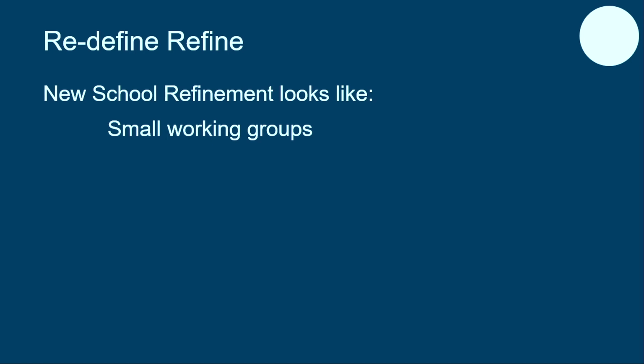Maybe there's a meeting scheduled, but the idea is that we've targeted the dev and the QE that are going to be working on it, either because from the dev standpoint, they know all about these features, or QE, simply because of the same way, right? So we've tested this before, we can actually speak to it. Shorter times, right? Instead of an hour-long refinement session where we focus on 20 plus stories, we're going to have maybe 1 or 2 stories that need to be refined, maybe a little bit more, because as we get used to this, we get even more optimized and more efficient.